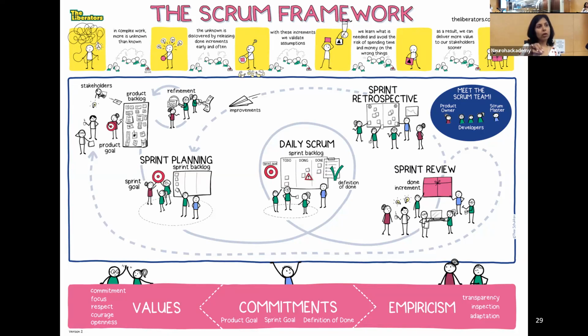From that product backlog, you can create a set of more granular tasks that goes into a sprint backlog. Oftentimes it's common to use 3-week sprints in the Scrum methodology, followed by often a 1-week sprint retrospective. They have that over here.